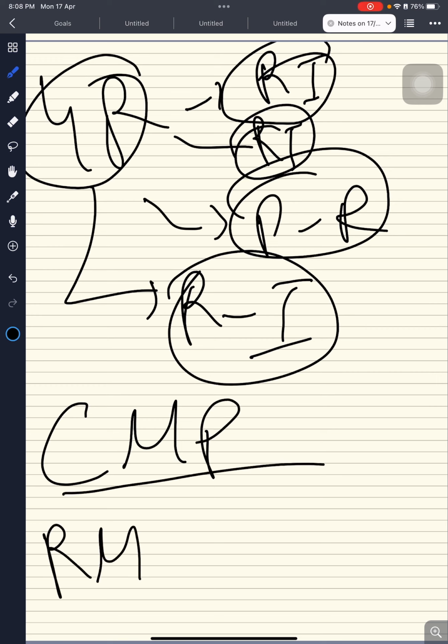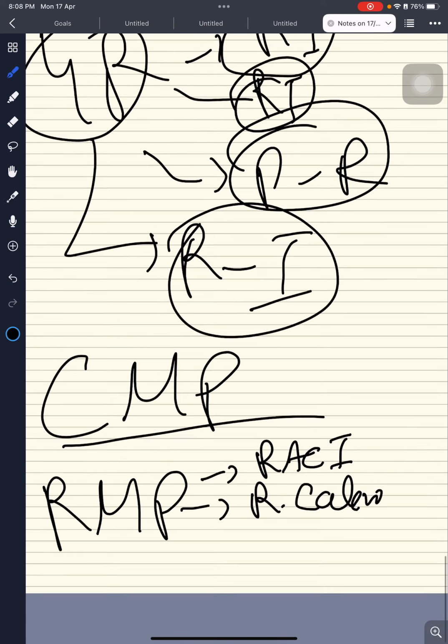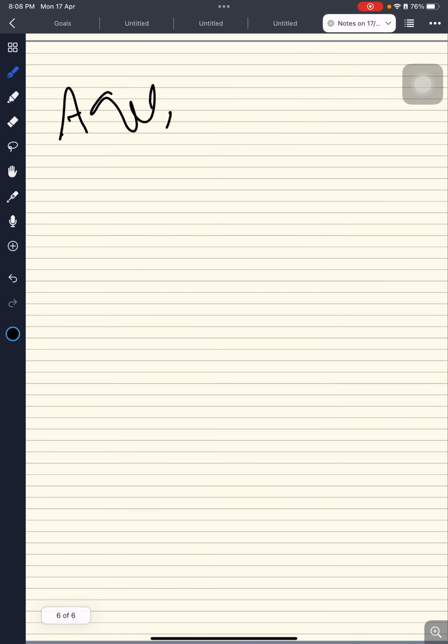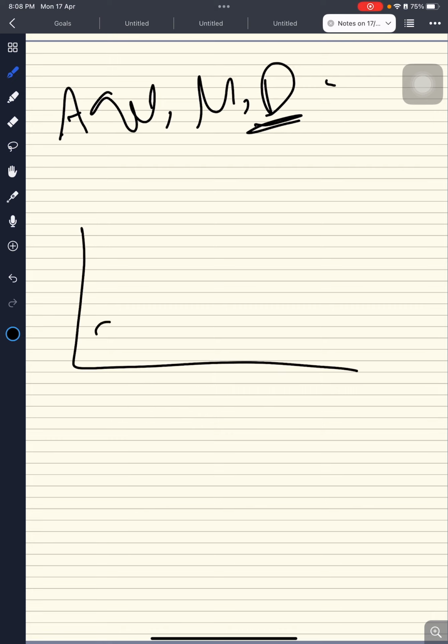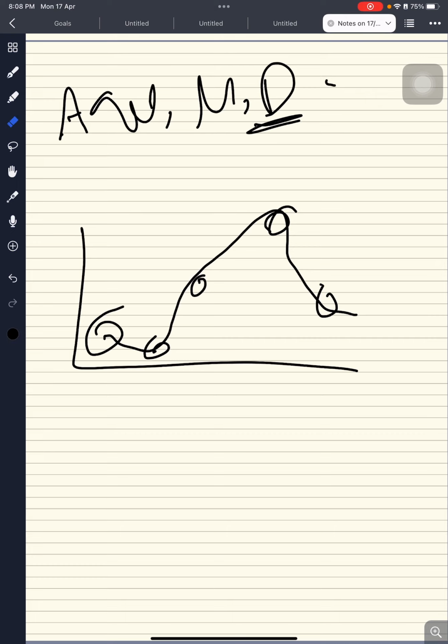Then we make the resource management plan, which will talk about who has which responsibility, when the resources will come, the resource calendar, how to acquire the resources, manage the resources, develop them, identifying their training requirements, and finally release them. So we use the Tuckman ladder: forming, storming, norming, performing, adjourning. That defines when the stakeholders are coming, when the team is coming, where the team stands.